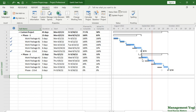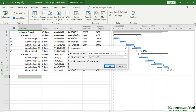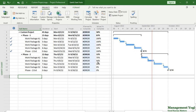The status date is shown with respect to this deadline. To remove the baseline, I go to the Project tab, Schedule group, and use the Set Baseline command and choose Clear Baseline. Our baseline has been set, and I can clear it — so I'll click OK. When the baseline is cleared, you are going to have error notifications again.